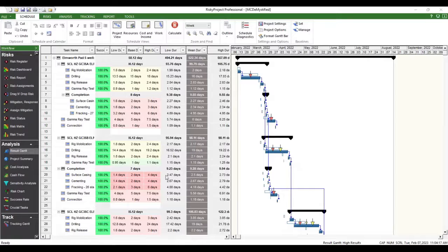Well, thanks, Scott. I'm just looking at this. Run 1,000. A lot of times, what I'm going to say is that should be standardized across your organization. A lot of times it'll be contractual, that you'll see in a contract, if you have to go to an ownership group, and they'll say you need to run X amount of simulations. And so you can enter that in. Sometimes I've seen up to 5,000. I haven't seen really any that go above that.